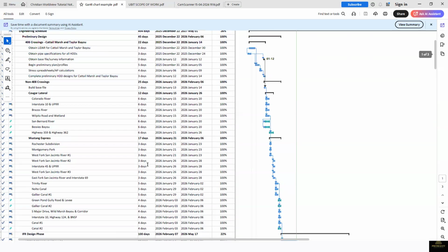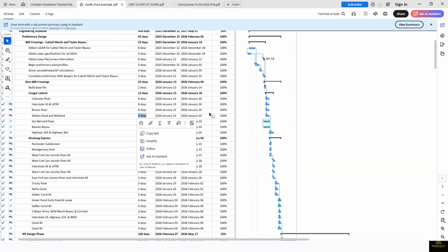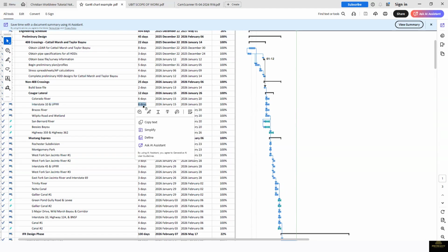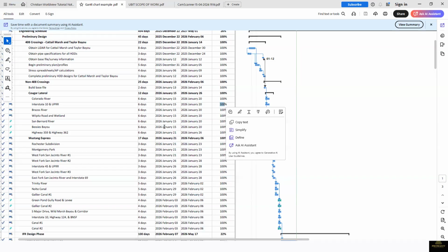So yeah, and this thing was supposed to be 6 days. We eventually, so it's either you change the date or you change the duration. There are a couple of ways, but most of the time for good practice, you are only changing the days. You usually don't touch the dates. For good practice, you are altering these days, and you are updating all the percentages. So if it's going to be 6 days, if it's now 8 days, you move to 8 days. If it's not 8 days, 9 days.